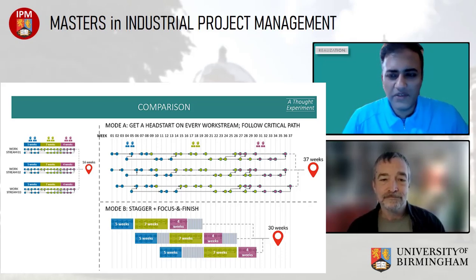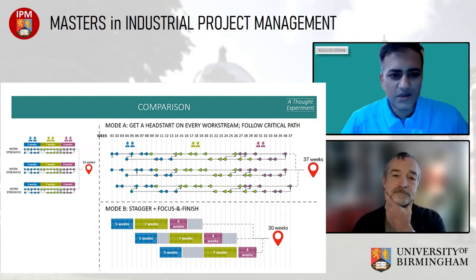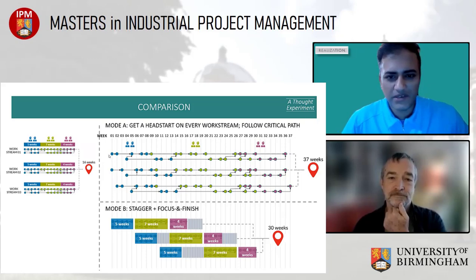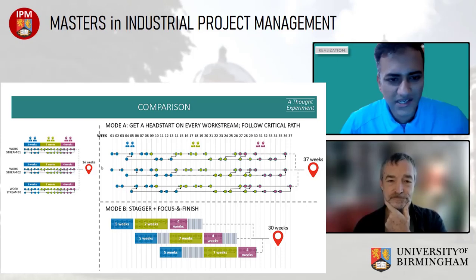If we go back, what we basically argued was that as long as resources are getting allocated in a constrained environment, as long as they're allocated according to the critical path method, and this was the example plan that we used, this is how the work has to happen. So if we go by critical path logic, and there are only limited resources available, there is more work available than the resources. Under this condition, the critical path logic tells us to prioritize the most critical tasks, and therefore this is how it will get distributed.